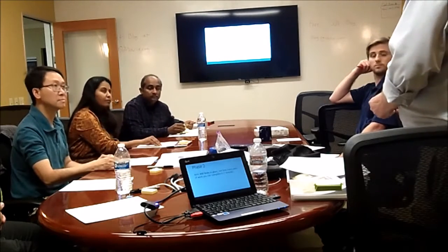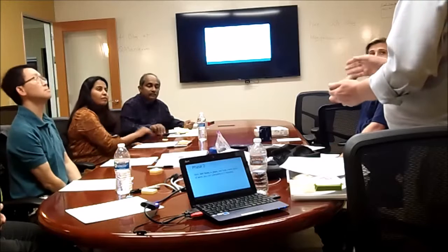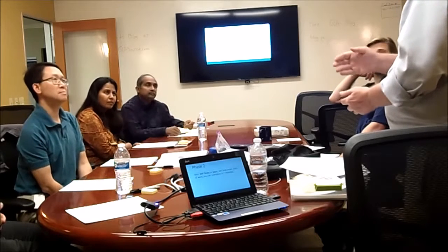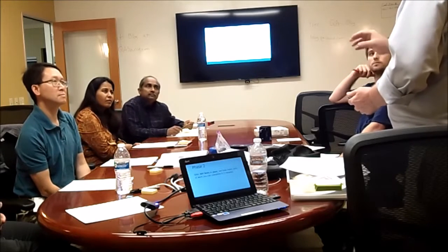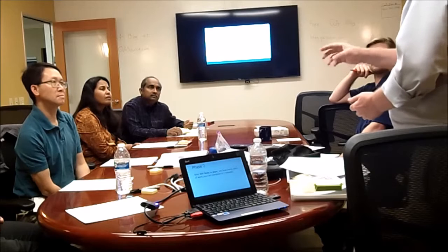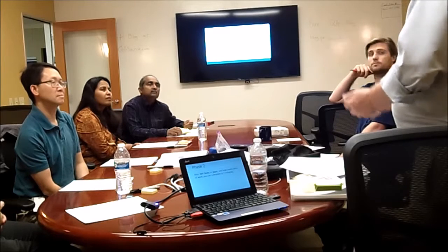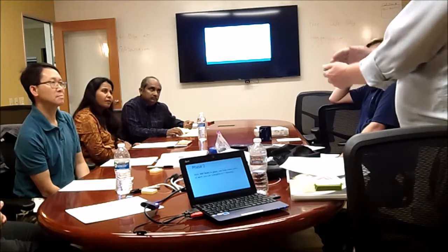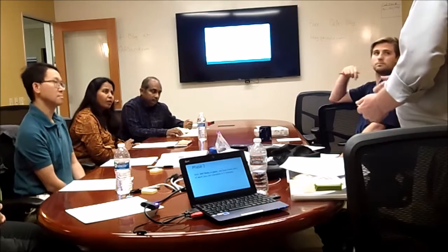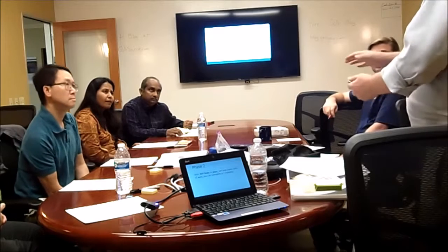Okay, stop. I remember what it was. If this were a software development organization, unless it was very small like this and you had only one person per job, then you would probably have higher numbers as WIP limits. For example, it's very common to have the WIP limit be the number of people that are in that operation. So 3 developers, you might go up to 3, like that. That's the next more complex thing than this. So thanks for letting me get that out.